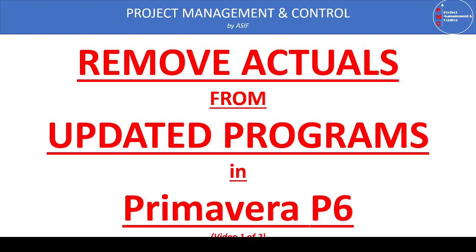Once I received the updated program from the approved design program, I got a request asking: what is the status of progress three months before, as per this approved baseline program? The first thing that came to mind was to remove the actuals from the current updated program, take a snapshot at that three-month-prior date, and then insert it into the approved baseline program.